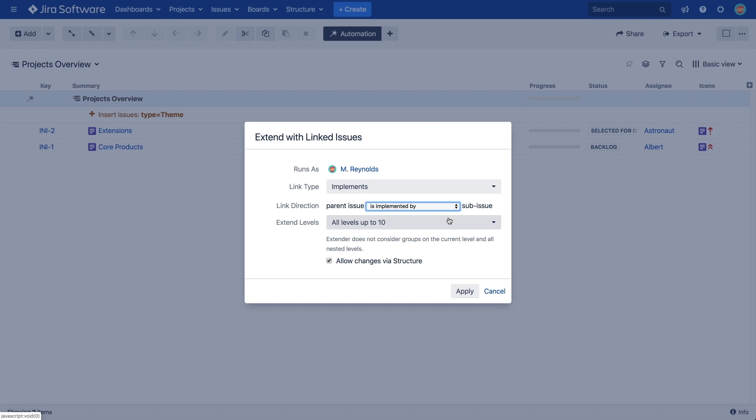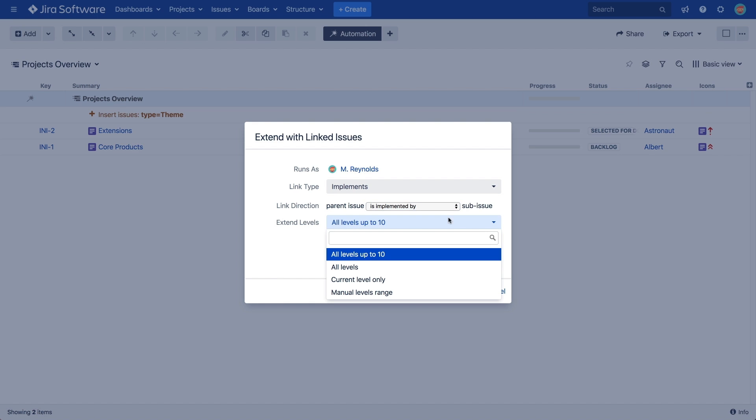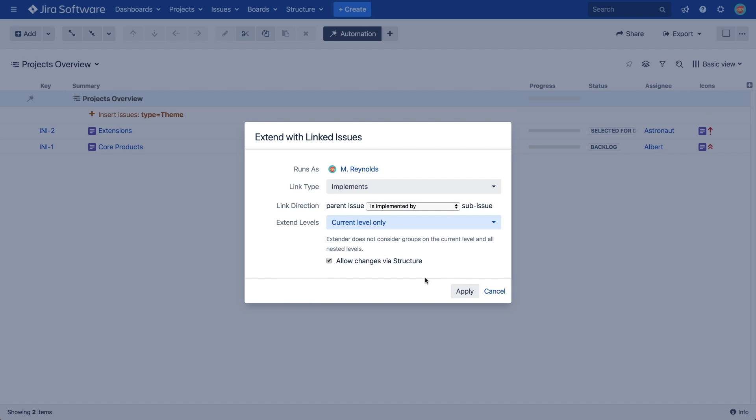A high Extend level could result in a complex structure. We recommend that you set this parameter only to the number of levels you need. In this case, themes are at the top level, level 1. If we set the levels to the current level only, the Extend generator will add child issues to the themes and stop there.